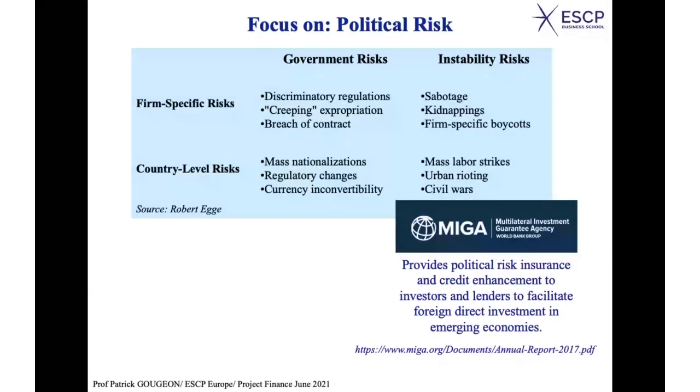So you see, if you can stabilize your supply cost with a contract with a provider of gas, and if you guarantee your revenue with a PPA with a public entity on the other side, you have a full guarantee on both sides, the supply and demand side. And therefore, you have highly secured cash flows that will allow a large amount of debt to be used to finance the project. And for the other risks, you have all these solutions, and particularly political insurance. So you have all these contracts, but are these contracts quite reliable? That's a point which we have to discuss later.